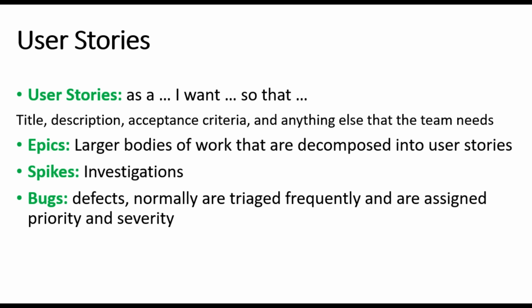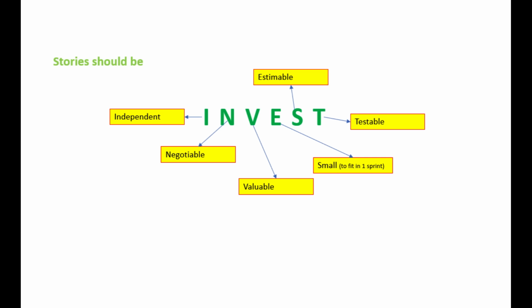User stories should be INVEST. What does it mean? It means that the story should be independent, negotiable, valuable, estimated, small, meaning that they can fit into one sprint or less, and testable.